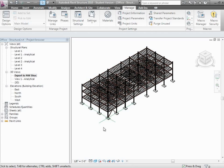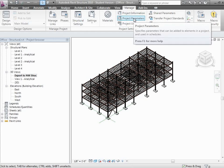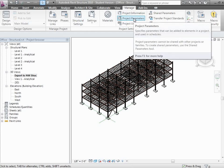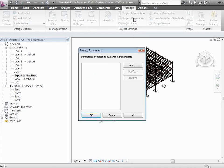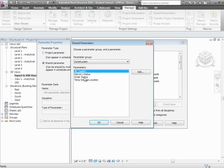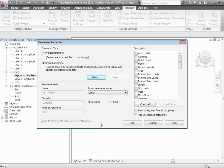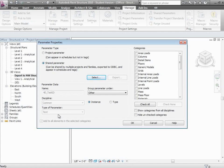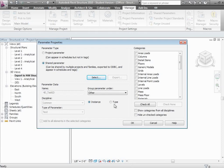Now we have to do the step of assigning them to the elements. That's under project parameters. Parameters available to elements in this project—let me add some of our shared parameters. It'll give me that list I just created. I'll go for 4DTaskID. Now 4DTaskID is a piece of text. I like it as text because then I can say 120A, 120B, 120C. Text is pretty flexible. I have the choice, is it an instance or a type parameter? Think about whether you want to change this value for every individual item or only the entire class. I'm going to be able to assign every individual column and beam separately, so let me get instance.